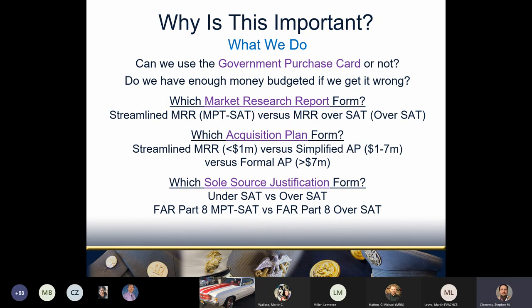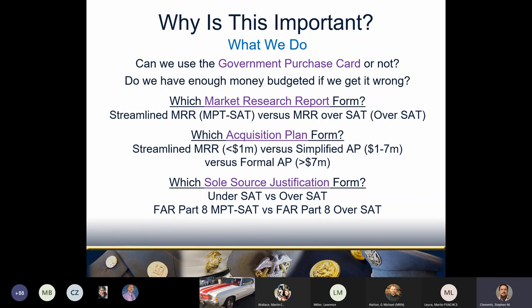We have to use different versions of at least three forms depending on the dollars. For market research reports: under $250,000 there's a streamlined market research report — four pages long; above $250,000 you use the standard market research report — 15 pages long. For acquisition plans: above $7 million use the formal AP document at 27 pages; between $1 million and $7 million use the simplified AP at five pages; below $1 million, CRG 5.3.1.2.1 says you can simply use the market research report. There are also at least four different sole-source justification forms depending on dollar value.